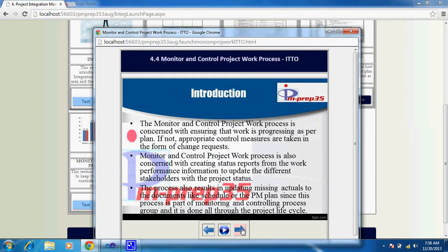The change control board approves or rejects this particular change. If it is approved, then the project team implements the change. The change can be implemented onto a deliverable, which is a process or a phase output, or it might be a change to the project's product as such.